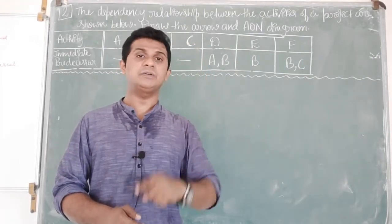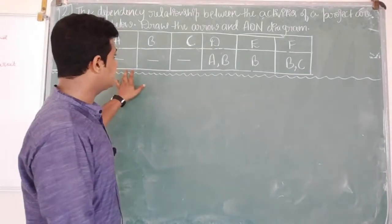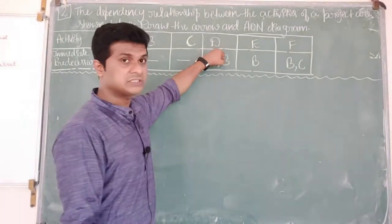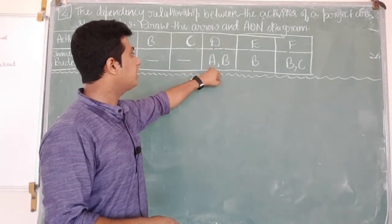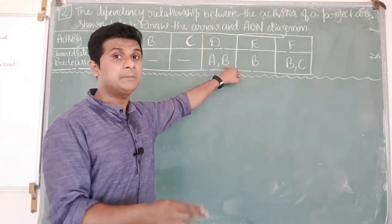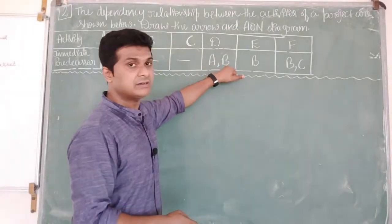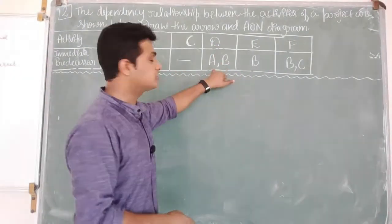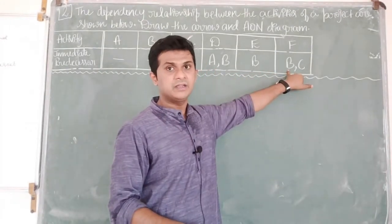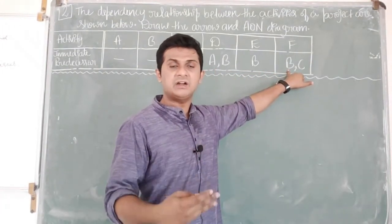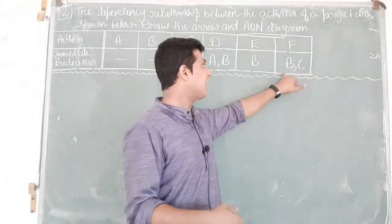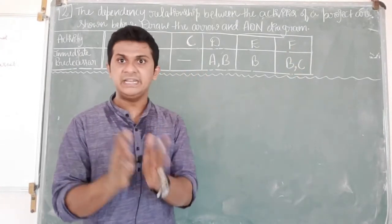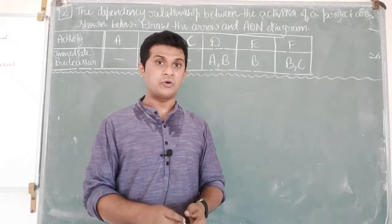The third important consideration is joint activities. Activity D can start only after activities A and B are completed, meaning A and B should join together before the commencement of D — these are joint activities. Similarly, before starting activity F, activities B and C must be completed, so B and C are also a joint activity. Considering these three aspects, we can move forward in drawing the arrow diagram.